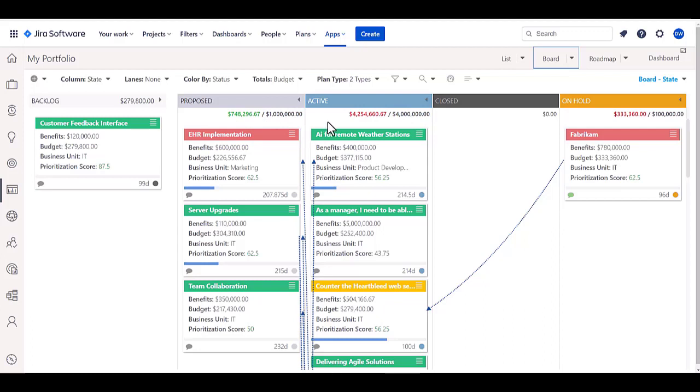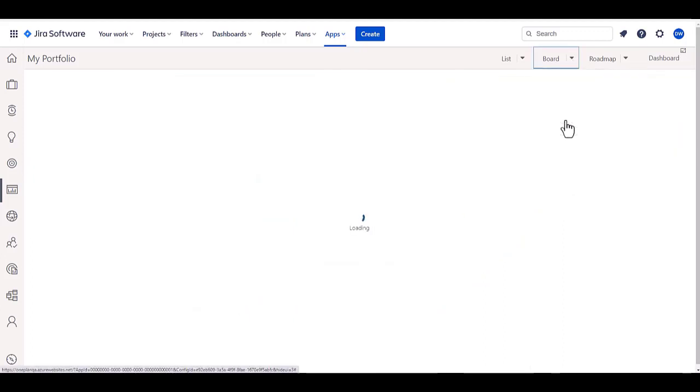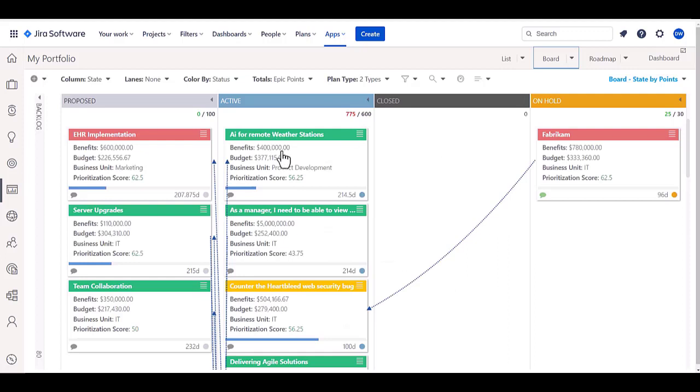I can even have variations of this board. Let's say, for example, state by points, and if I have a limit on story points that I would like to have in any one active state, more of a kind of a work in process limit, I can have that in here as well.